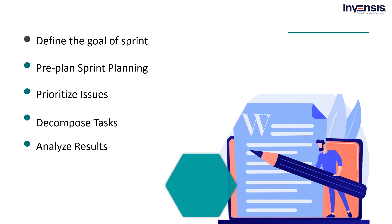The next tip is to prioritize issues according to the team's productivity level. There are no clear guidelines when it comes to the prioritization of tasks. This decision is up to the product owner or scrum master, and the team's discretion to discuss and decide what work will be undertaken to reach the desired results. Some teams decide to start with smaller tasks while others start with complex ones and leave easier tasks for the end. There is no right or wrong way as long as all members are aligned and tasks help them fulfill the goal. The next tip is to decompose tasks into smaller components. The goal is to avoid having any task with an estimation for completion that exceeds a full day's work, as working on a single activity for more than that can leave a member behind on progress and unmotivated. Breaking a bigger task into pieces is not only an easier goal to reach but also a simpler method to collaborate with others.